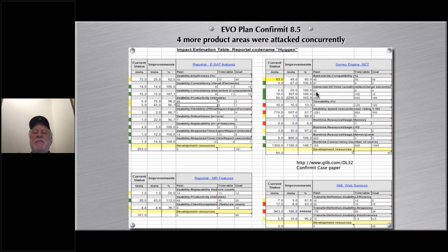The burn down chart, except it's really a burn up towards value chart, where we can see, and each one of these is managed by the 16 developers and testers, about 4 people here, about 4 people here, about 4 people here, about 4 people here, who've been given 12 weekly increments, 12 sprints, to deliver the goal levels by the end of the quarter of a year when they release the software. And I'll make a long story short, in using this method, they invariably were able to attack and deliver 25 simultaneous quality or value targets every time they tried.